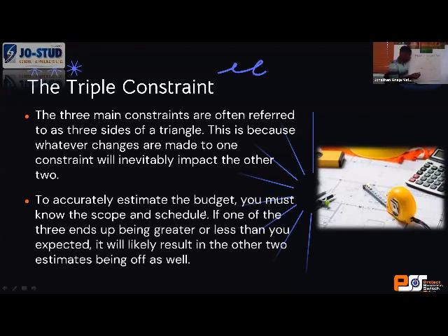Now, what I started yesterday, I think I put my cost on one side of the triangle. I put my time, and I also put my scope. And I said everything will impact on the quality of your delivery. It's impacted by these three constraints. So I remember saying if you add scope or some work to your scope and you decide not to change your cost and or time, what you are doing is that you want them to do a substandard work for you.